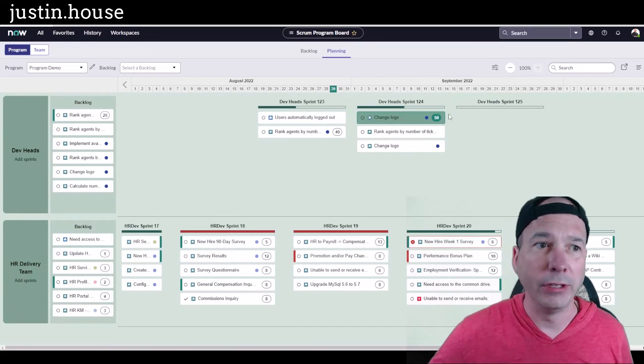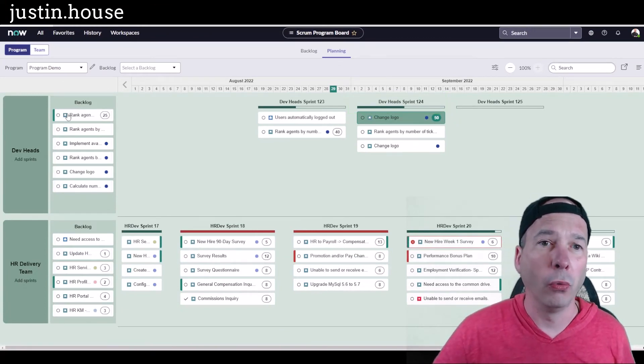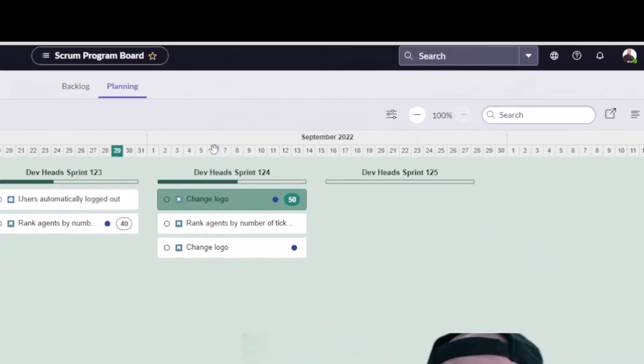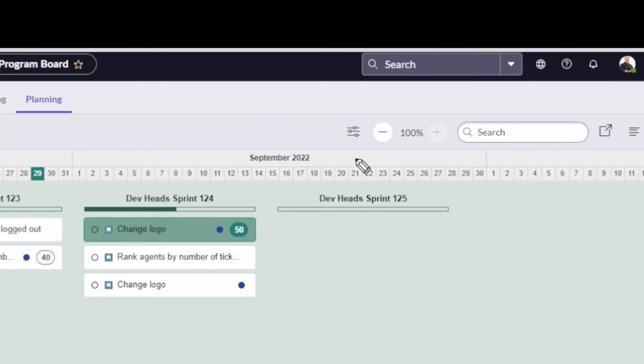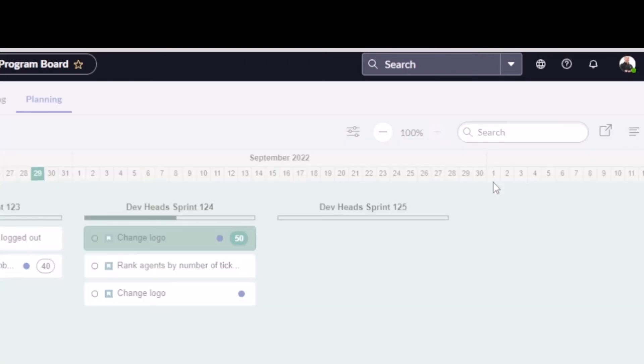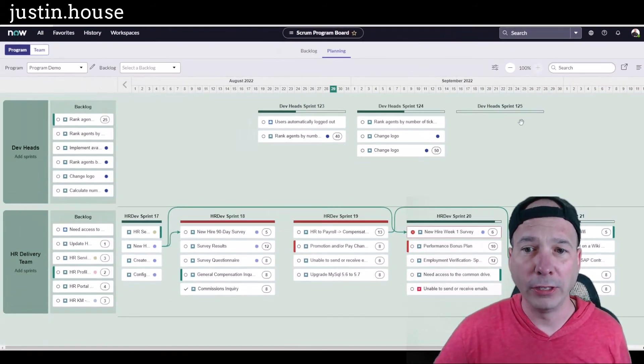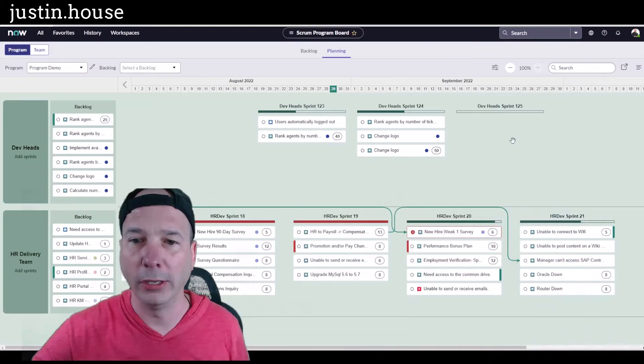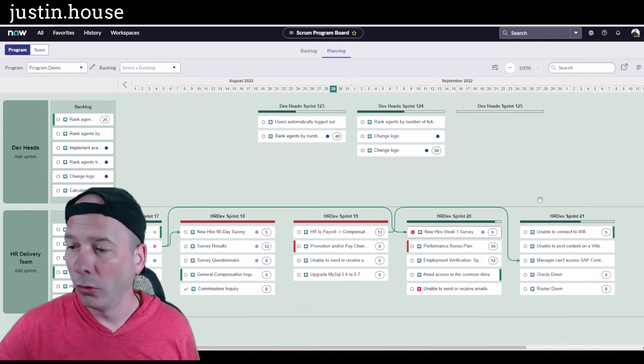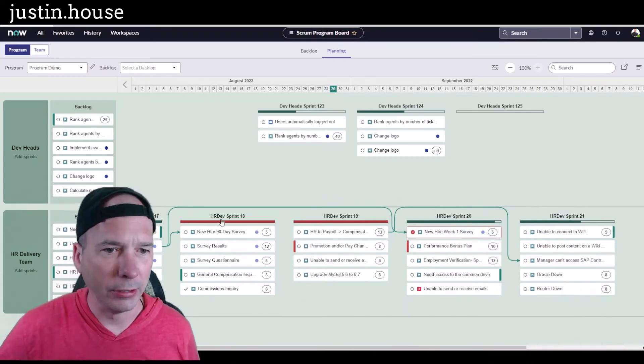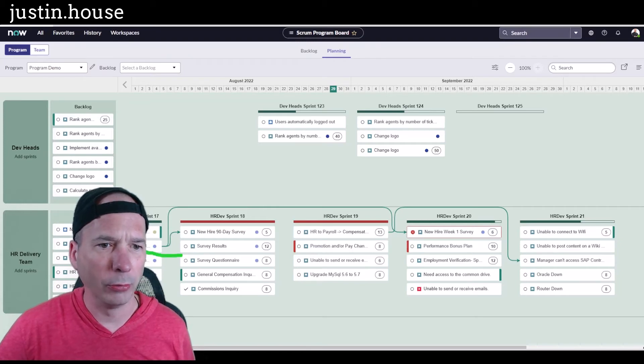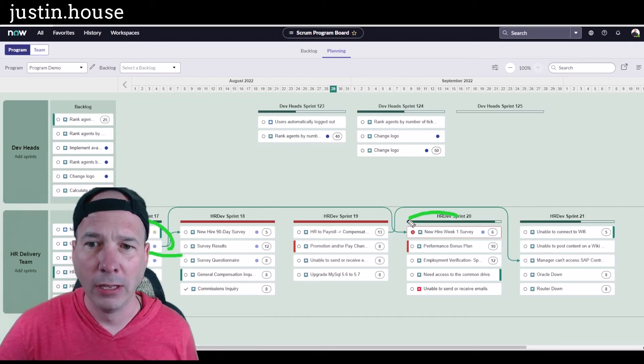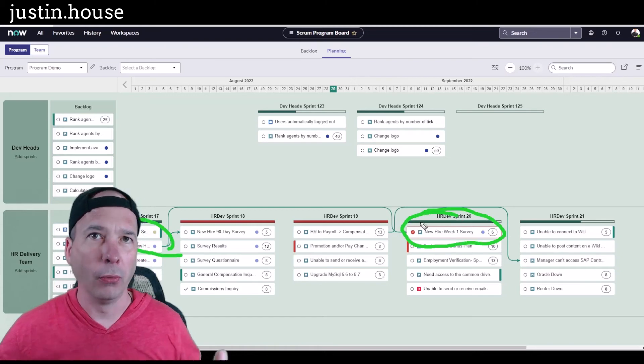The other thing that's neat is dependencies within ServiceNow. For my stories, I can see that there's actual dependencies. I'm going to point out a little button here at the very top, it sees three lines and three dots, and that allows me to turn on my dependencies on this particular view. We should see that there's some stuff out of order. We've got this particular sprint, dev sprint number 17, has a story in it that depends on something happening in sprint 20.